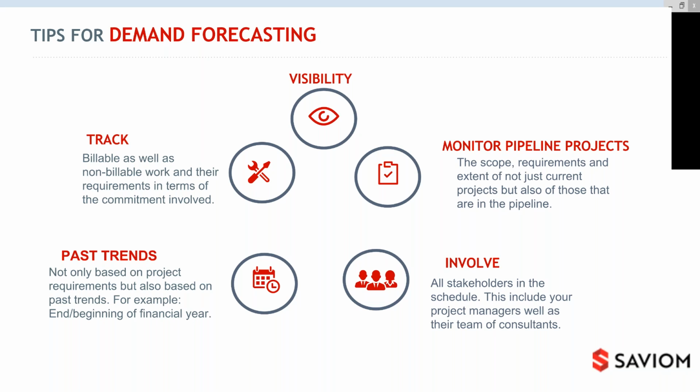From there, if you look at about 5 years of your data of how your project work has been determined, that is a very good indicator of exactly when the busy periods are and when the slow periods are as well. I'd say give a bit of flexibility for the more ad hoc type of work as well, because I understand that new projects can come in every single year, but there is a good portion, I'd say up to 50 to 60% of this schedule, that will remain the same year on year, and you should take full advantage of that as well.